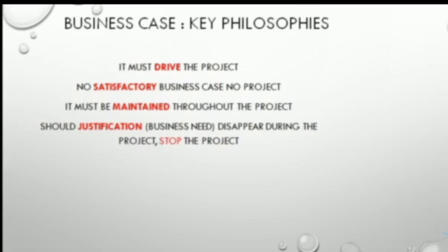So your focus and determination should be put into the project. Once you have developed a satisfactory business case, make sure you maintain the objective all through the course of the project. Then it says, should justification of business need disappear during the project, stop that project. Now, once there is no need for that project again, stop the project.